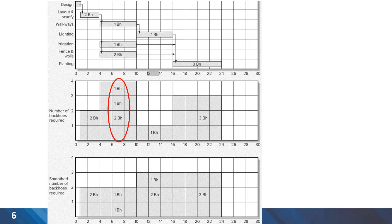Looking at the relationships between project activities, we can see there is one activity — fence and walls — which has only one successor, which is planting. To reduce the demand for backhoes in the peak period, we can move the fence and wall activities to a later date. Because it has some slack and it has only one successor, it doesn't result in delay of project completion. In the bottom graph, you can see the smooth number of backhoes required for different periods.